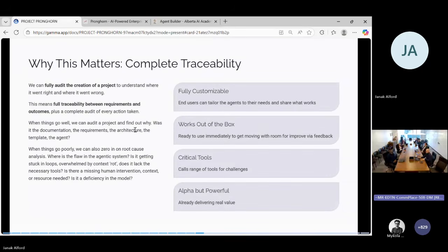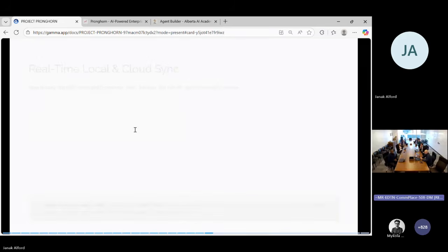I spoke a little bit about the traceability. I won't spend too much time on the slide, but there's also traceability in outcome, right? So a client has asked for 100 different business requirements over here. You have 500 pieces of code over here, 500 files. Do you meet the requirements? AI actually needs to be able to understand how close we are and how much work there is to do. And if not AI, then you, because requirements traceability is key.